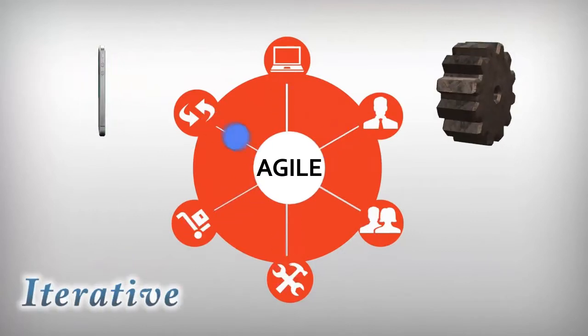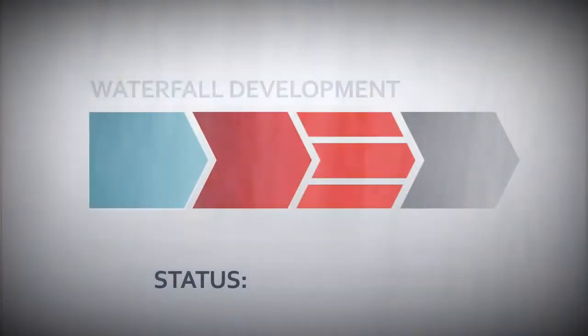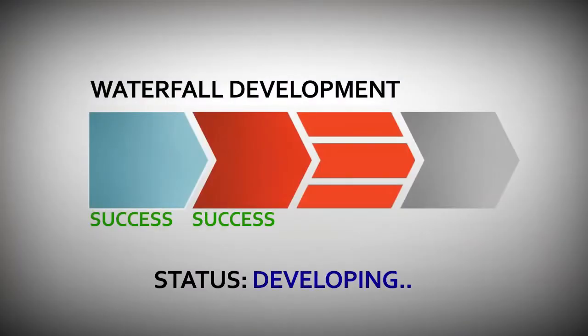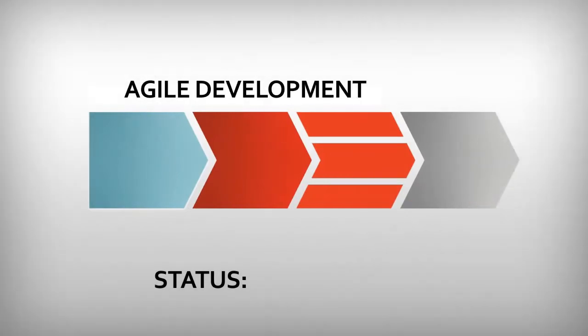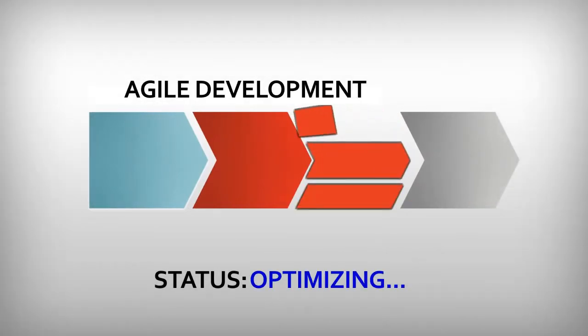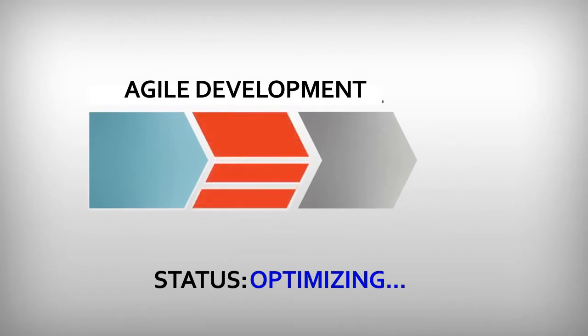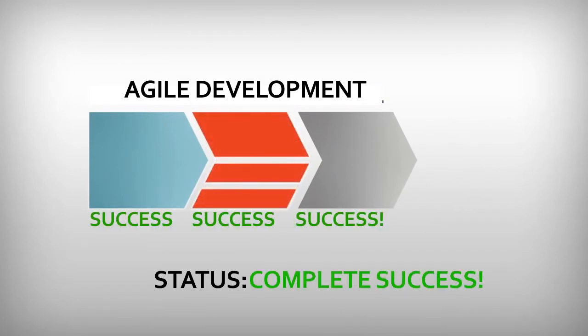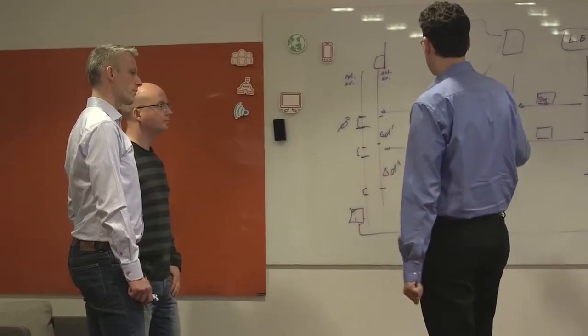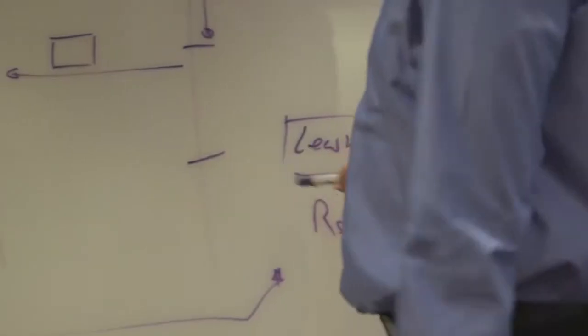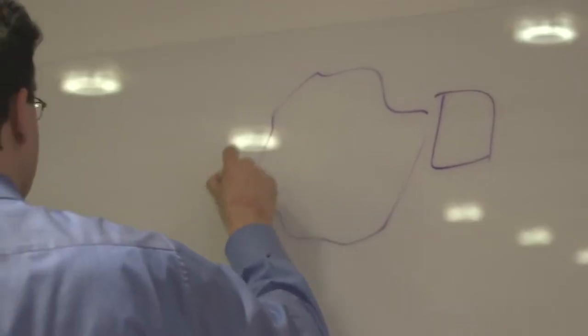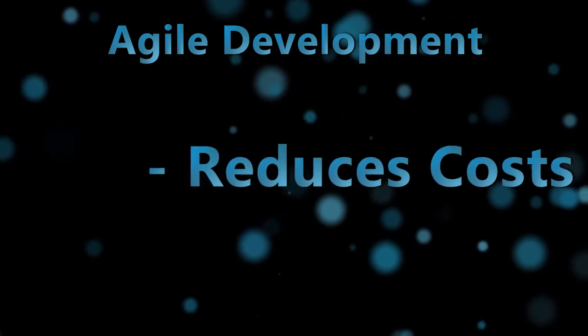In waterfall development, teams only have one chance to get each aspect of a project right. But in an Agile paradigm, every aspect of development, from requirements to design, is continually revisited throughout the life cycle. When a team stops and reevaluates the direction of a project every 2 weeks, there's always time to steer it in another direction. So the results of this inspect and adapt approach to development greatly reduce both development costs and time to market.